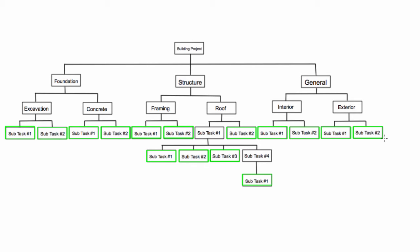Something else to mention with the work breakdown structure is the level. So the project level is always referred to as level one. We'll write that over here on the side. Project level will always be level one. And every time you have an element that branches off into more elements, you're increasing your level by one. So all of these guys,